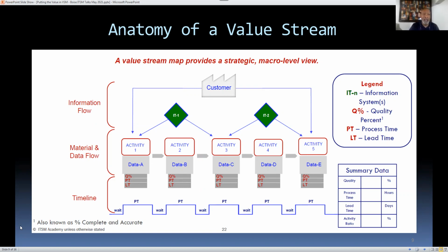And oh, by the way, by the time I went from quality of activity 1, 2, 3, 4, 5, you could end up down at a 25% level of quality. Now, let me ask you a question. What are your stakeholders who are supposed to get value from, or realize value from, the demand that they submitted and now they have it? How do you think they're going to react if we took 5 weeks to get it to them and it only has 25% quality, which may have happened by going 70% times 30% times 50%?